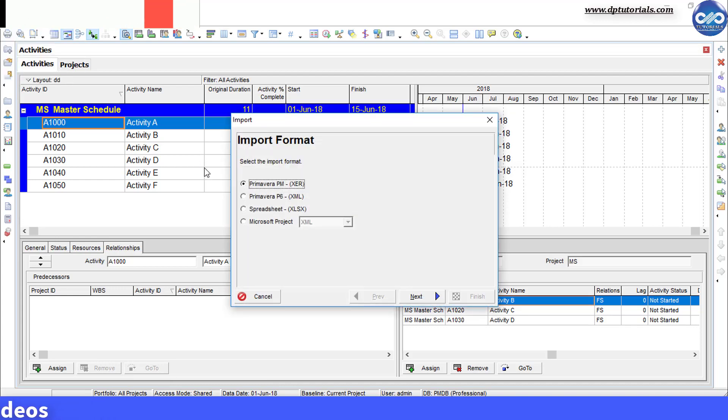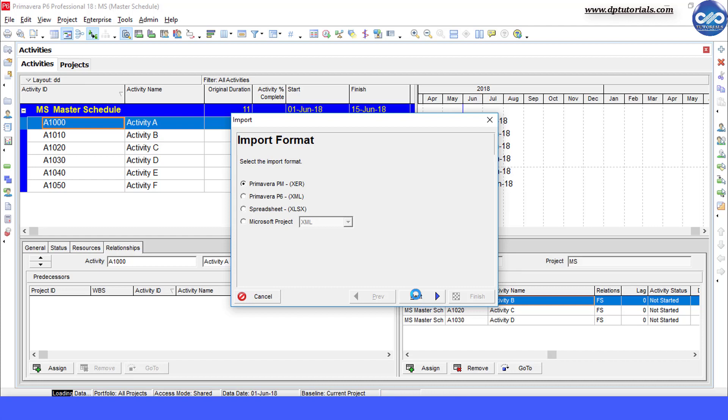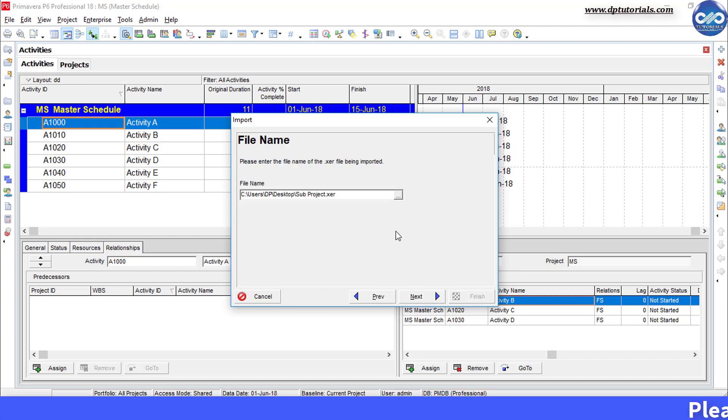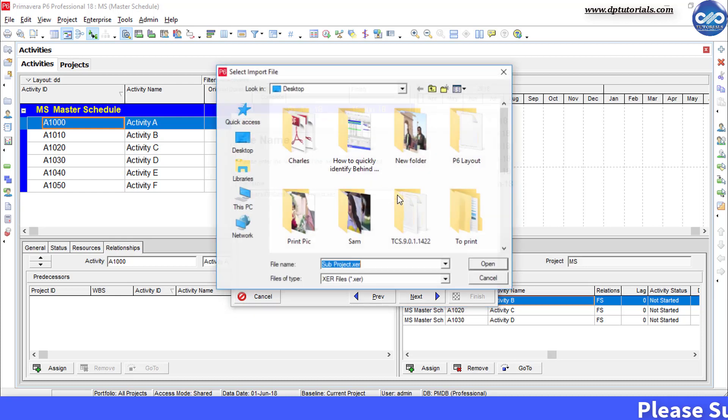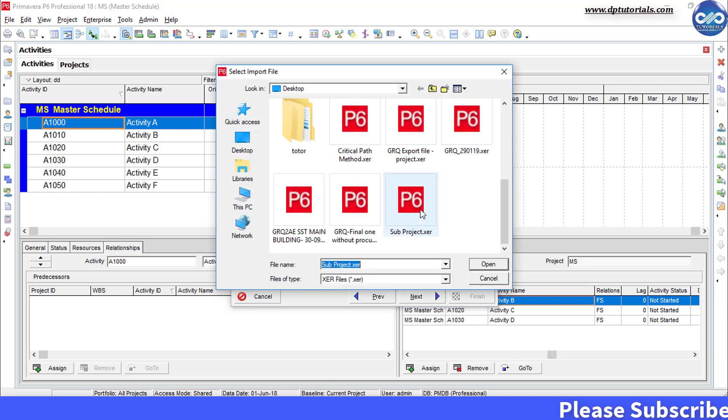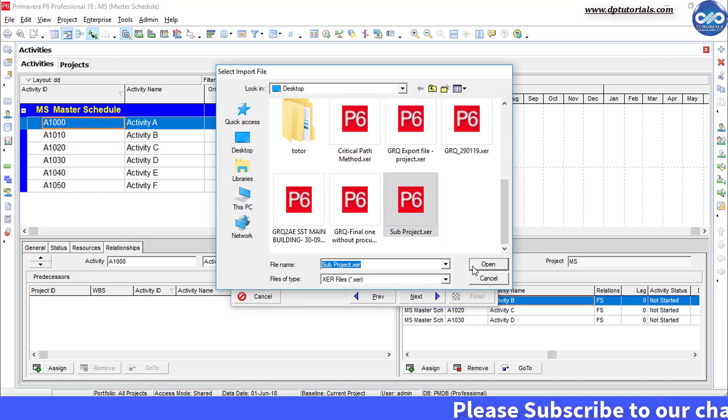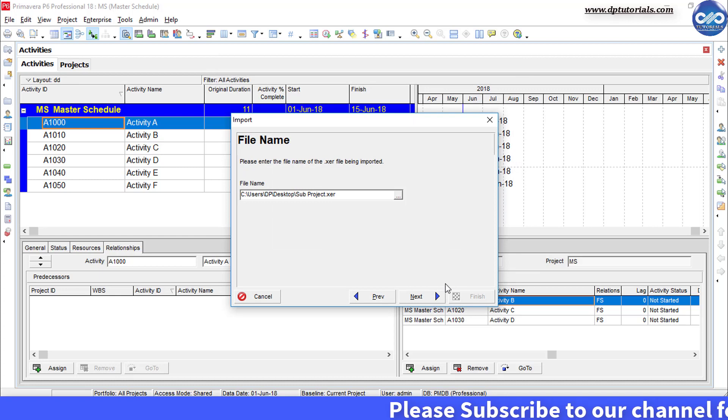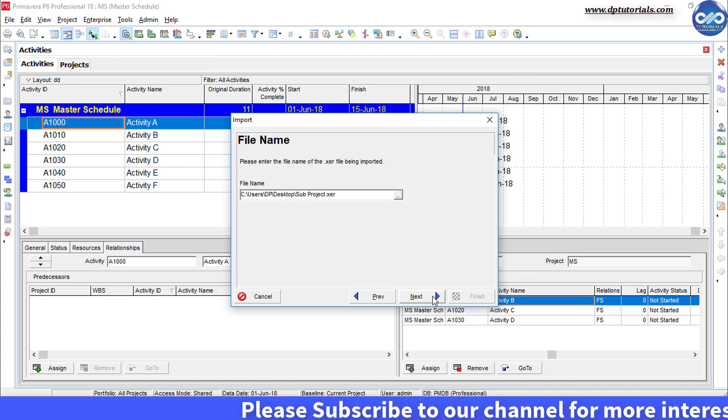Select the xer format, click next. Select project option and click next. Now browse the file and select sub project xer file from the desktop and click next.